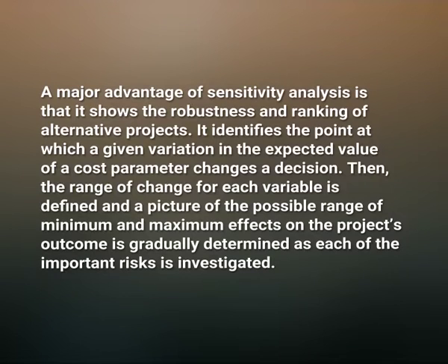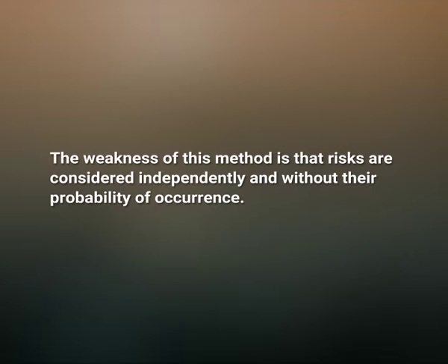projects. It identifies the point at which a given variable in the expected value of a cost parameter changes a decision. Then the range of the change for each variable is defined, and a picture of the possible range of minimum and maximum effects on the project's outcomes is gradually determined as each of the important risks is investigated. The weakness of this method is that risks are considered independently and without their probability of occurrence.